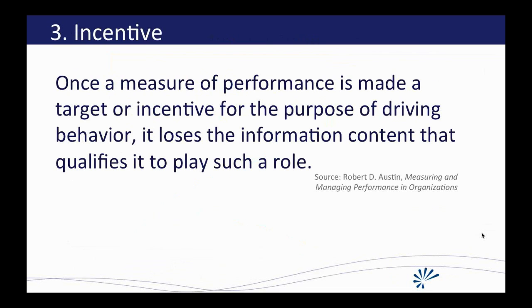And I see this all the time. I've seen organizations say, hey, the PMO is going to schedule a meeting with any team that varies their velocity by 20%, not just down, even over. We want to help, in air quotes. We want to be able to meet with you to see how we can help because your velocity was off by so much. Just something that subtle is enough incentive to make that velocity number no longer useful.